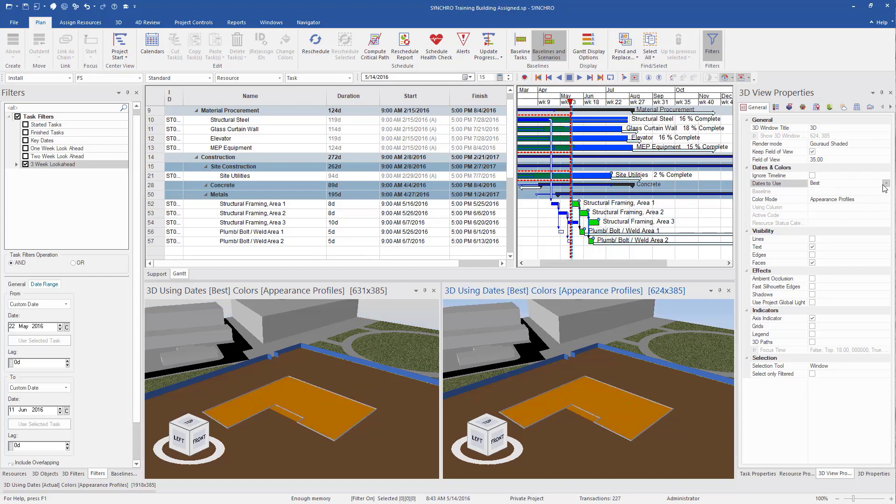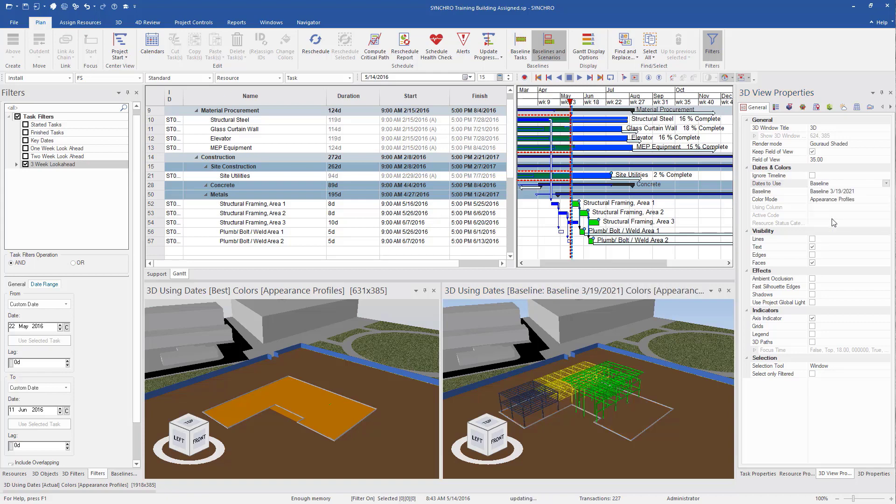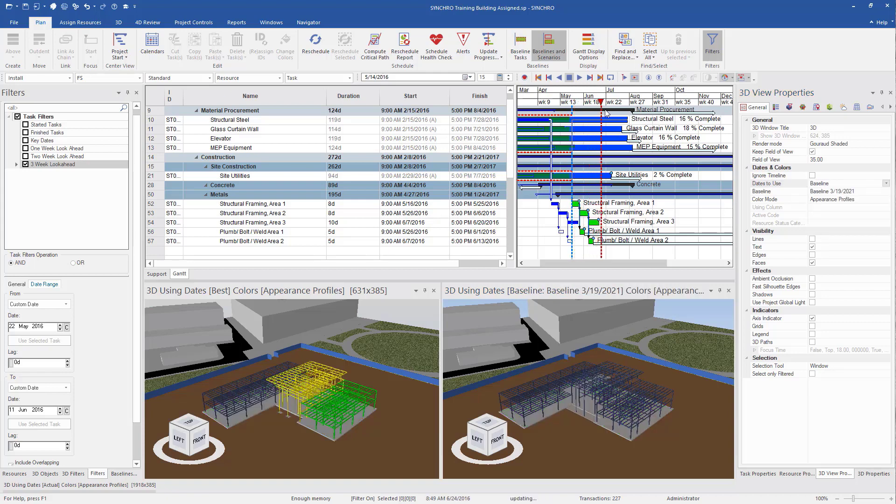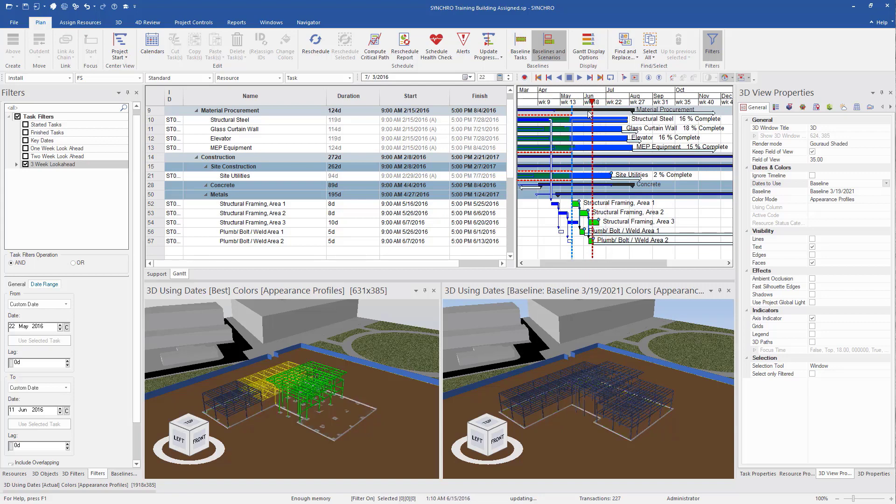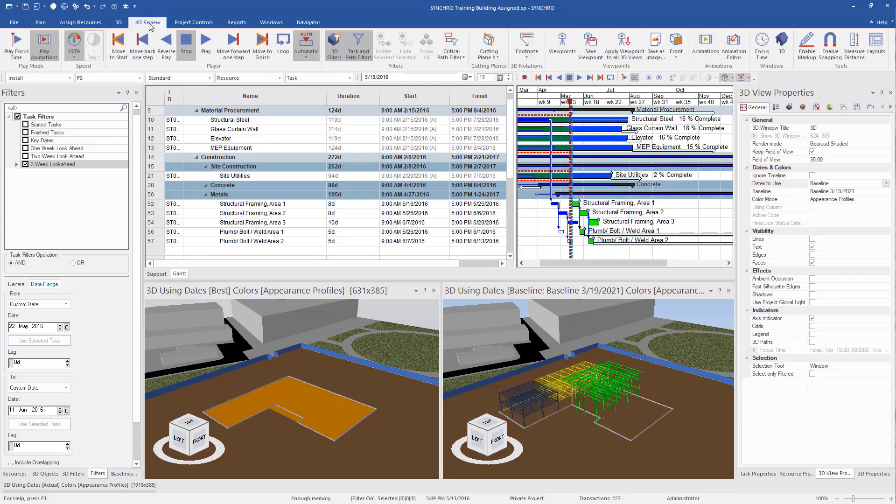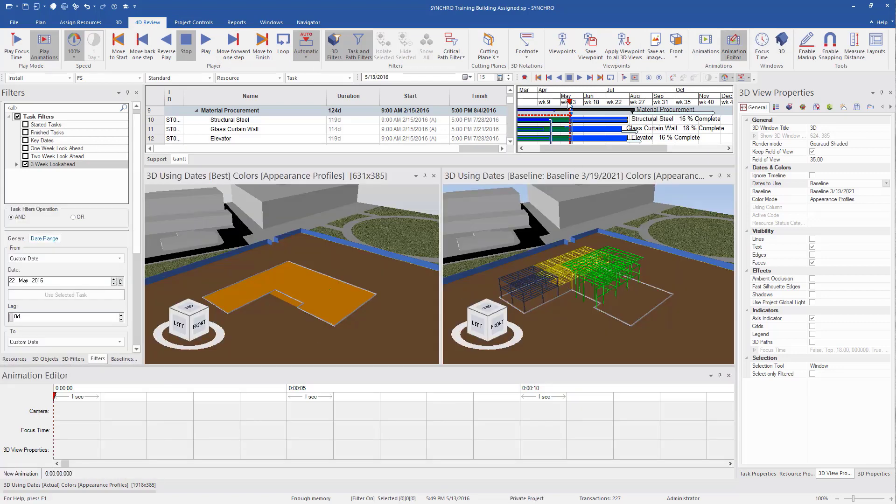So we want to change the one 3D screen to our baseline so we can see our planned versus actual. So now when we scroll through, we can see that we have our planned versus actual. Looks like our actual is a little behind.